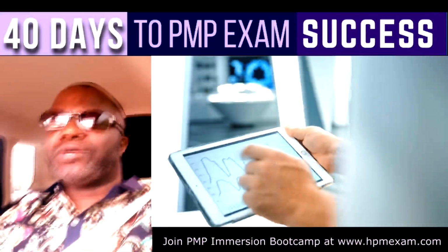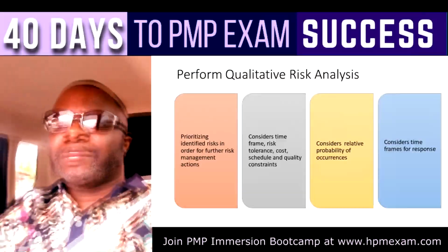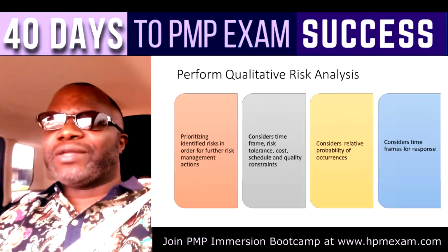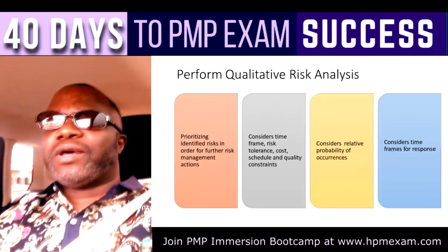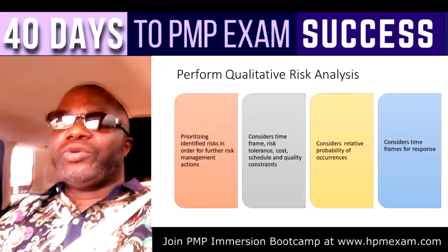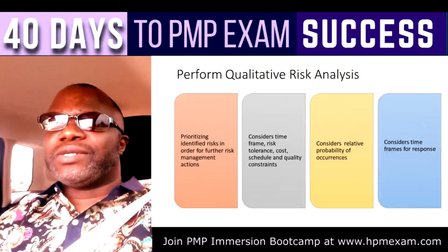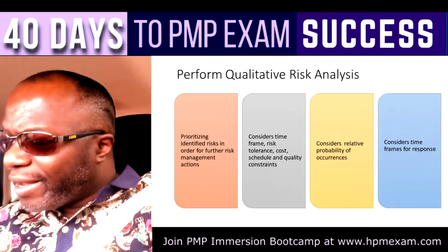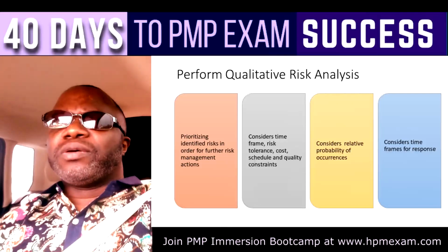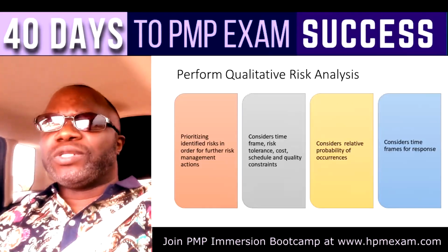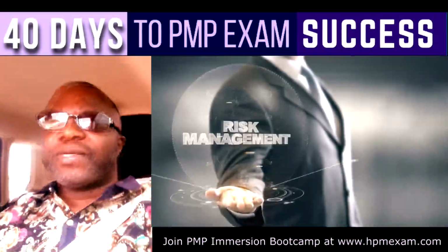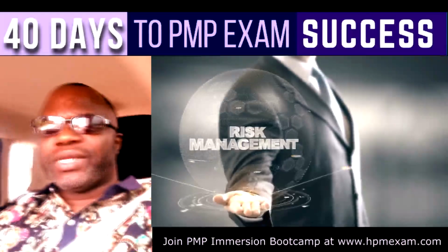And the key thing is you're going to prioritize these risks. You're going to rank the risks. And those that are ranked highly, you will do a further analysis on. Those that are not ranked as high, you're going to leave to fall to the bottom of the register. And we call that a watch list.